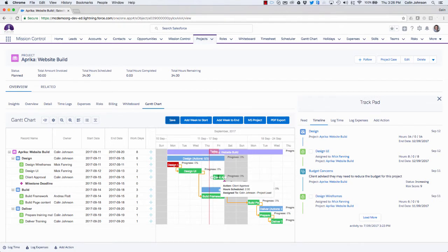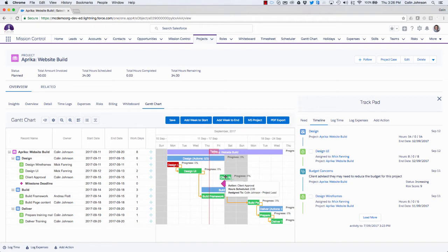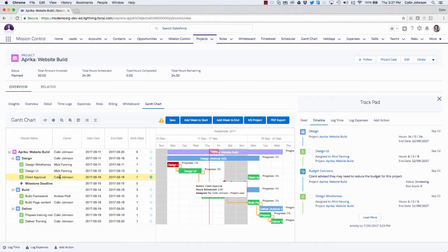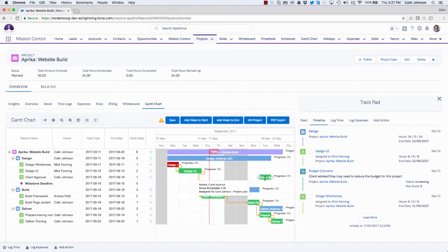So a few other things to be aware of. Obviously, we have our non-working day feature within mission control. So for example, if I try to reschedule that action to be scheduled onto Saturday, what the Gantt chart will do in the background is say, well, we don't work on weekends. So what it will do is automatically reschedule it to the next available working day, which might be the Monday. Now, taking that one step further, what it will do is actually go away and check to see if this resource is actually on holiday that day. And if they are, they would automatically reschedule it to the next available working day.